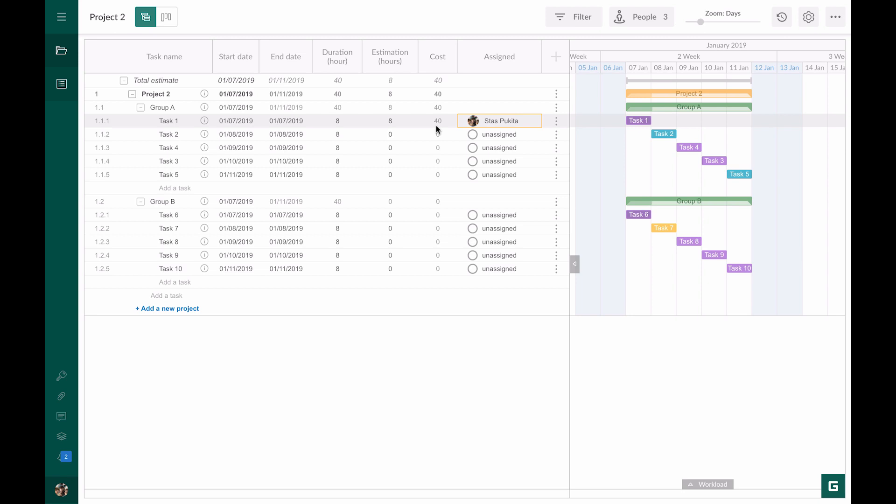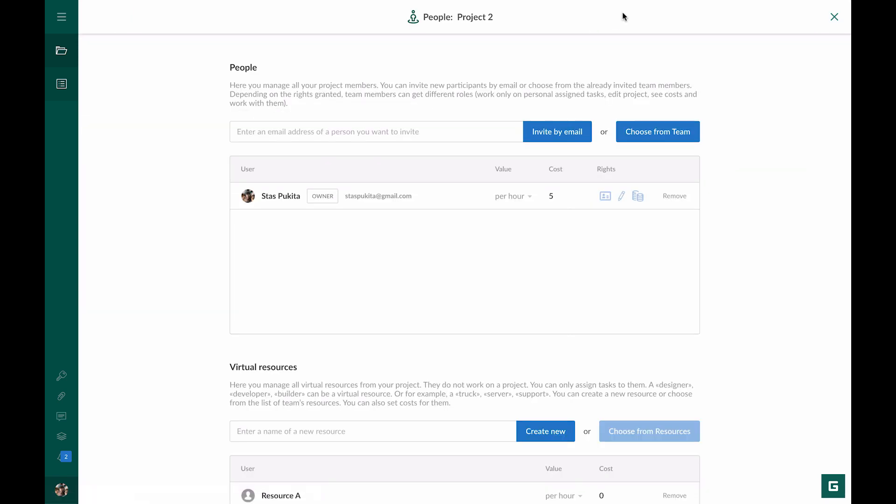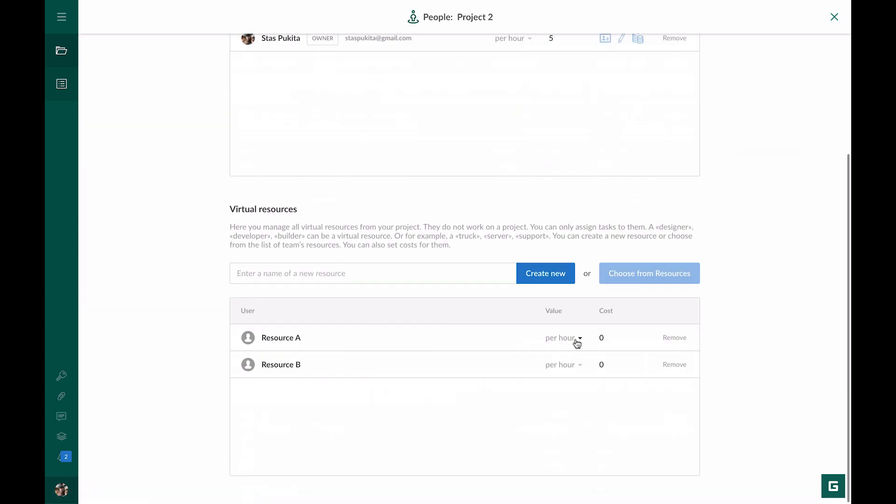Now let's take the cost for a material resource. We go to the People button again. For example, I have Resource A, and I set the cost per item for it. For instance, one item of Resource A costs $10.